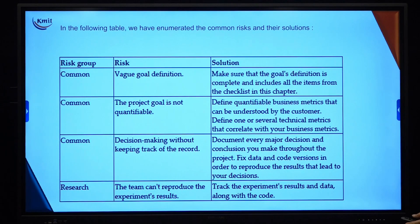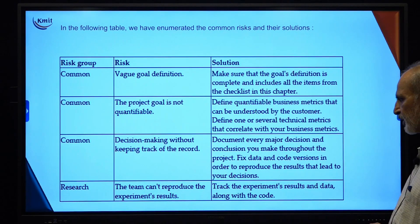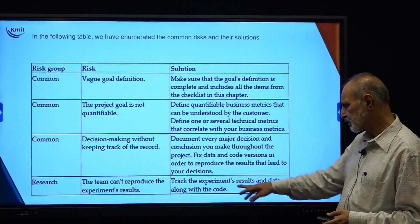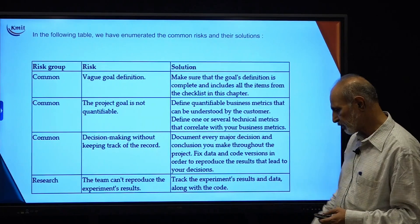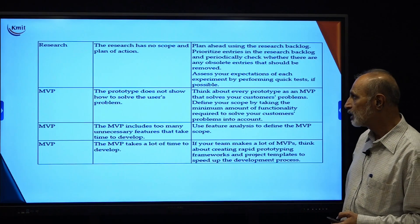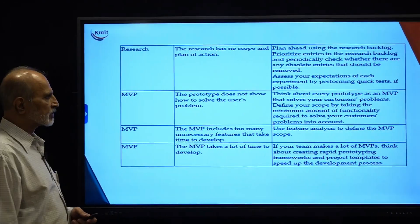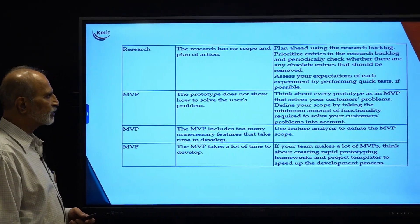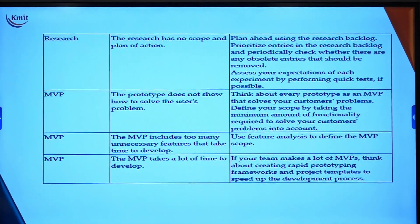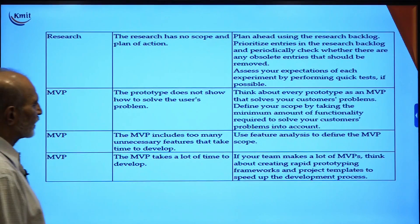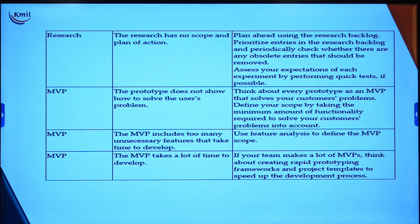Under the research category: the team cannot reproduce experimental results — the solution is to track experiment results, data, and code. Also, research has no scope or plan for action — the solution is to plan ahead using a research backlog, prioritize entries in the backlog, and periodically check whether there are obsolete entries that should be removed, and assess expectations.